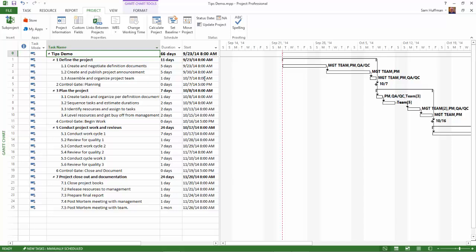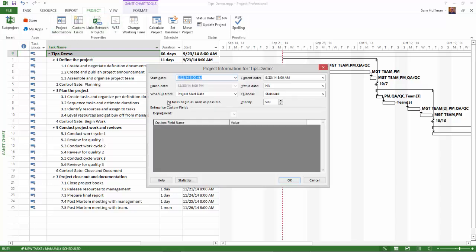Now I'm going to go back to Project Information. Note the new project start date. It's almost a year later. I changed it to 2014.